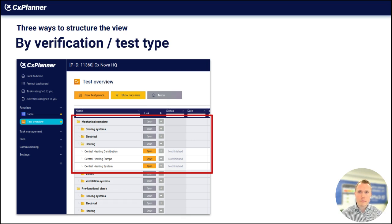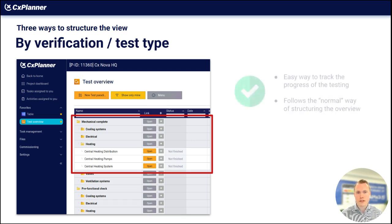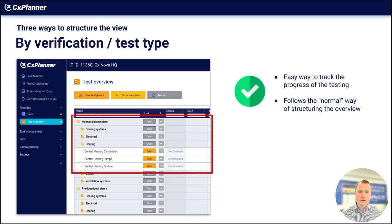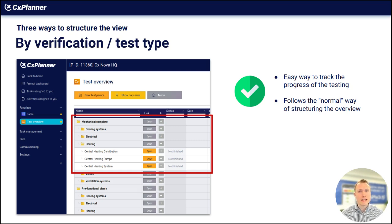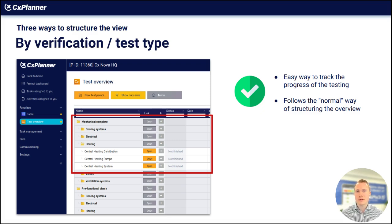There are some pros and cons. The pros: using this structure gives an easy way to track the progress of your testing. You can get a percentage completion of all the mechanical complete checklists, and when you move to the next area — the pre-functional checks — you can also get a full status report. It gives a good view of progress from the current state of the project across these main verification areas. It also follows the normal industry way of structuring the overview, so people can recognize it when they see it.